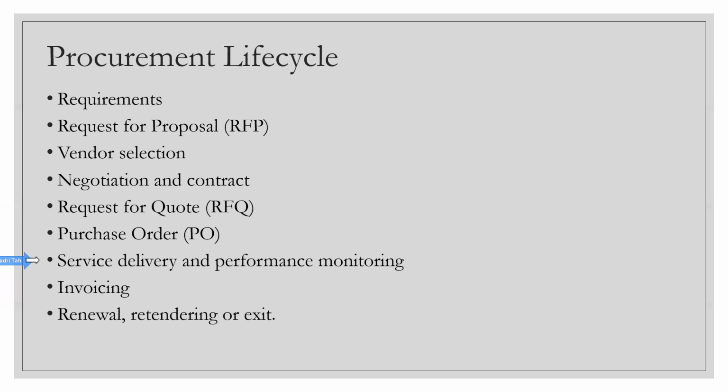Based on the dates promised by the vendor, you also have to check whether the dates are being met or not, and accordingly you can change the health status of your program in Workfront. If it's green, great. If you are seeing a threat somewhere, like a shipment delay, let's say from Singapore to US, you can put the program on amber, until you get a proper status from the vendor. Or it can be red as well if the vendor says,